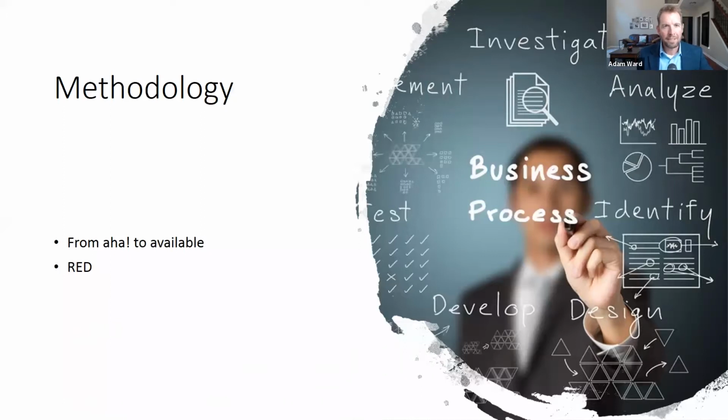One of the big areas that we veer away from in the RED framework, from an Agile framework, is that unlike software, we can't launch something every week or every 2 weeks, not because we couldn't actually do it, but because if we're going to tell physicians and nurses that there's a new way of doing things, we can't retrain them every 2 weeks. That's just silly. So there's a pace that organizations have changed that they can handle. Every organization is different. It may be 3 months, it may be 6 months, it may be 2 years.